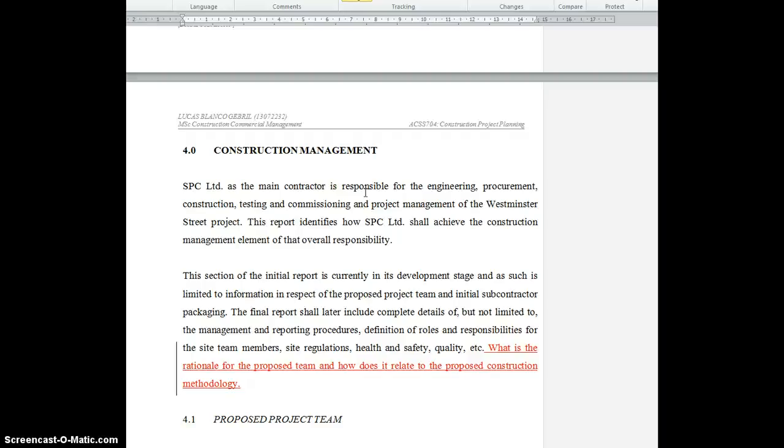You're then going to say at feasibility, to develop the construction methodology and the planning, etc., we need to have this person and this person and this person, and the deliverables from this phase are this, and the deliverables from the pre-construction phase is this, and the deliverables at the construction phase is this, and you're going to start identifying personnel that you require to do that work. So that's what you have to do there.